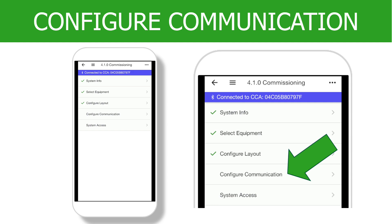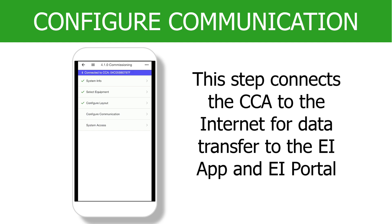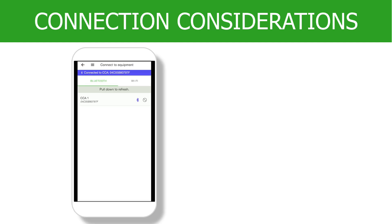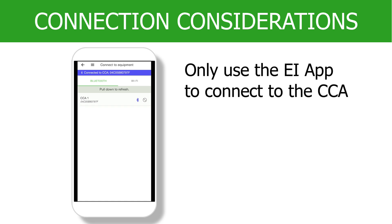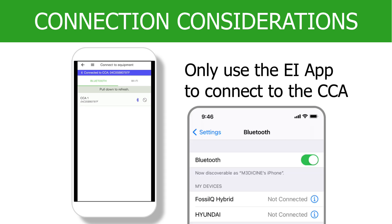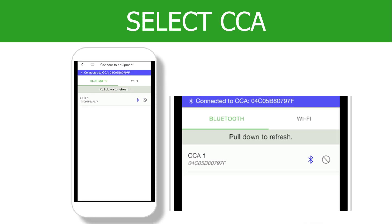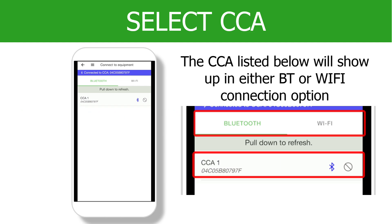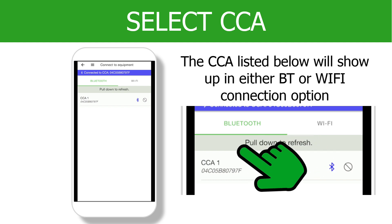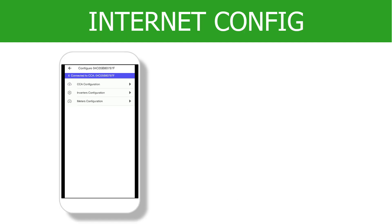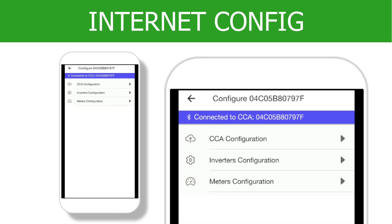Select Configure Communication. For this step, we will connect to the CCA using either Bluetooth or Wi-Fi. You may still be connected to the CCA if you see the blue bar message at the top of the screen. Only use the Tygo EI app to connect to the CCA — never use the smartphone's Bluetooth feature to directly connect to the CCA. Once your smartphone is connected to the CCA, it will show up in either the Bluetooth or Wi-Fi screen. Tap on the CCA to continue. Now that the smartphone is connected, we can configure the CCA to connect to the Internet so that it can send data to and from the EI portal.